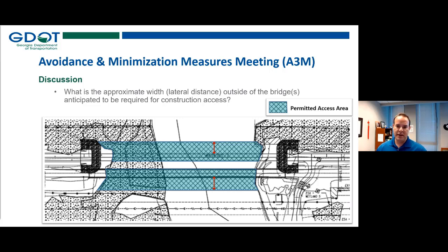Again, forgive me for repeating a lot of Chris's presentation, but to reinforce it, not every section 20 plan will look like this. Some will have areas hatched between the bridges. Some projects will only have areas hatched on one side of the bridge. And I do want to mention that we are not looking for precision at this stage. What we are looking for is a comfortable width that we feel can accommodate the most likely span lengths on the project and the ability to construct them with reasonable methods.